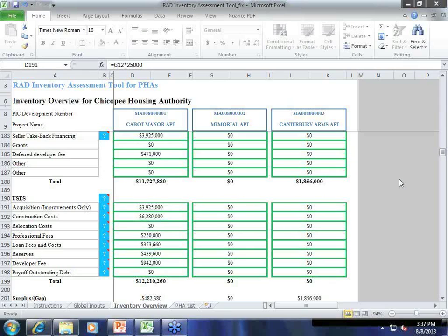Thank you so much for the clarification. I would add just one quick thing to that: the PCAs are kind of like appraisals in that lenders and investors like to use their own people, or at least have input into the PCA process. So it's a good idea, once you get your CHAP, to contact your lenders and let them enter into the agreement with the PCA provider, or at least make sure that they're going to accept the report from the PCA provider. Okay, very good.